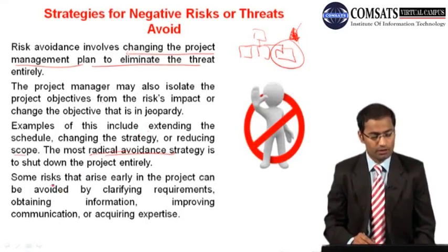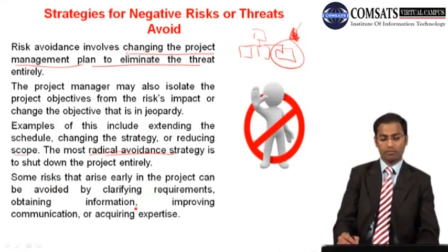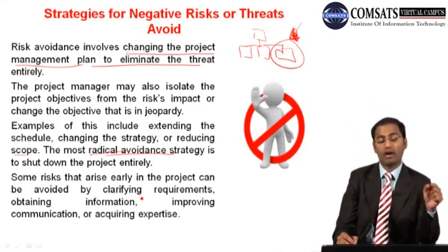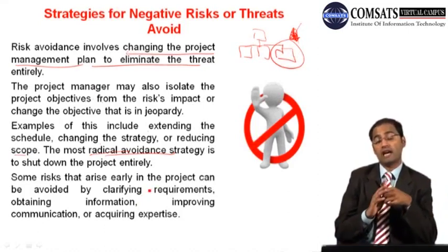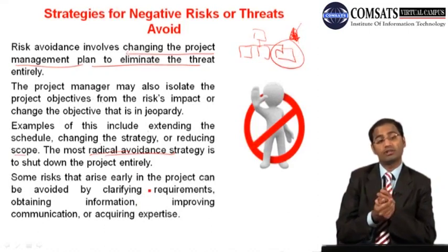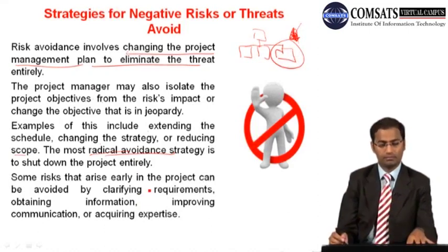Okay, so some risks that arise early in the project can be avoided by clarifying requirements, obtaining information, improving communication, or acquiring expertise. So this is about the first strategy for negative risk or threats. You just avoid that.